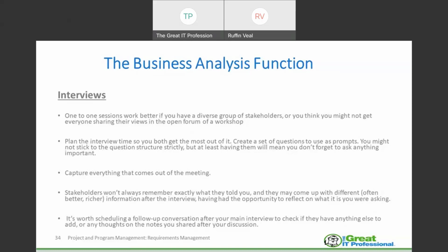that you do when you're involved with your interviewing techniques and you're involved with gathering that information and scheduling those interviews. The bullet point at the bottom there is the one that I want to highlight here. We have to understand that if you have interviews, you're probably going to have follow-up conversations, okay? It's not just necessary to schedule an interview, or I've done the interview with the VP of accounting, and that's that. You may need to come back to those people again as a secondary follow-up interview. Plan for that type of thing.